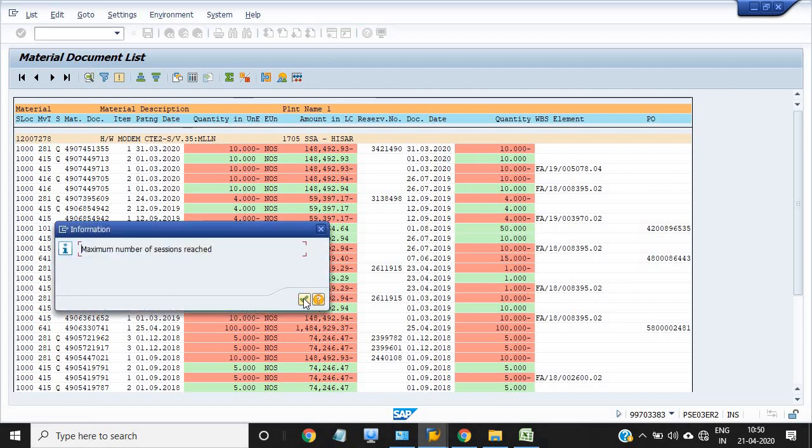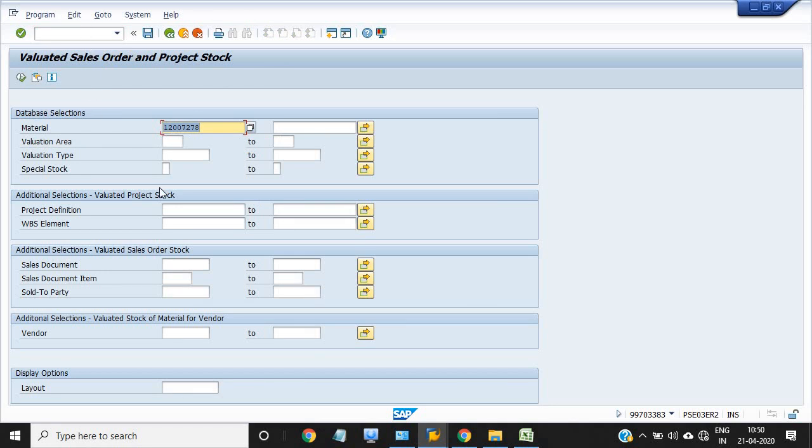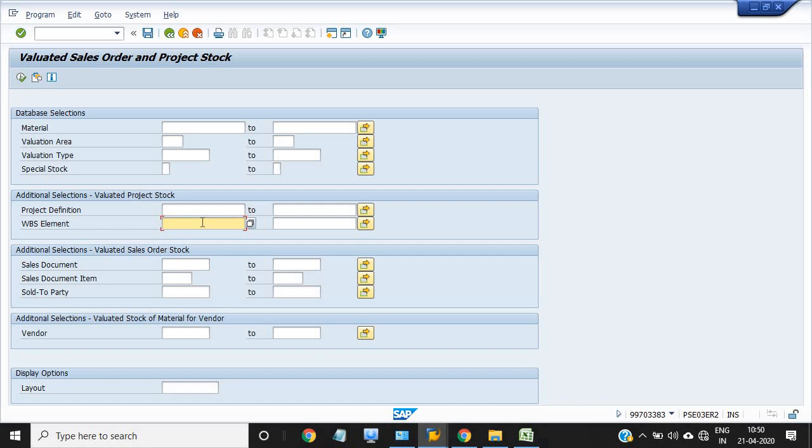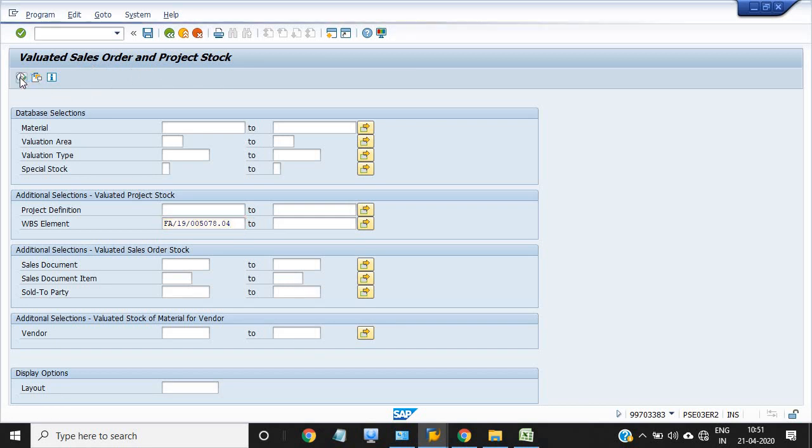Once I want to check the project stock, see using transaction code MBBS. MBBS is a transaction code. You just enter the WBS number is here. MBBS is evaluate sales order and project stock in a particular WBS. You just check, nothing is available. Successfully consumed all the materials in our network.